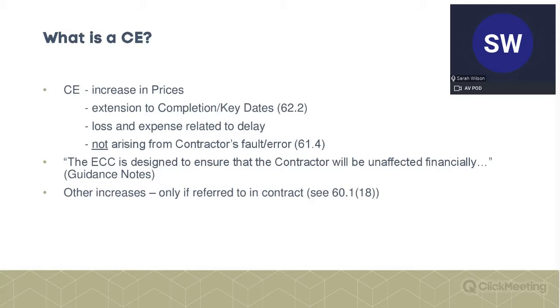Now, this quote is helpful to contractors and subcontractors, because what it's saying is that the NEC ECC is designed to ensure that the contractor will be unaffected financially as a result of using the schedule of cost components or the shorter schedule of cost components.